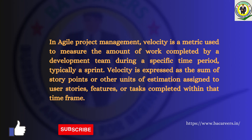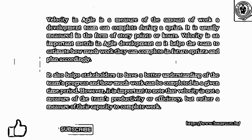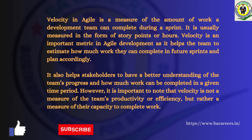Velocity in Agile is a measure of the amount of work a development team can complete during a sprint. It is usually measured in story points or hours. Velocity is an important metric in Agile development as it helps the team estimate how much work they can complete in future sprints and plan accordingly. It also helps stakeholders have a better understanding of the team's progress and how much work can be completed in a given time period.